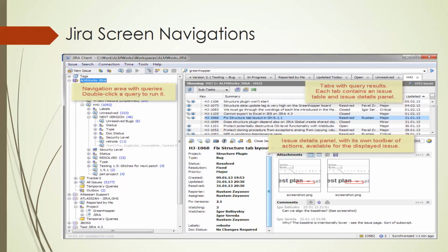That particular section we can still raise here: it is working, but it is not allowing me access for some section. So the tester will create an issue or a kind of bug that will reflect here. Again, the developer will work on that one. Parallelly, when testers are creating a bug or issue, they will mention the priority: it's major, minor, or critical. When the developer finishes that aspect, they will map it as closed or resolved. This happens for each sprint or story.